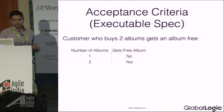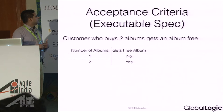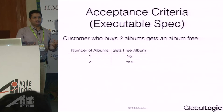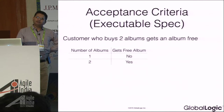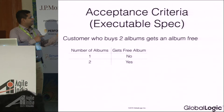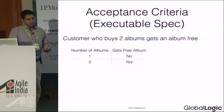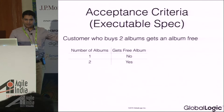This is how acceptance criteria looks. Specification by example means you have specs, but with examples you get more clarity. If I say 'customer who buys two albums gets one album free,' I'm giving an example. One album? No. Two albums? Yes. It's a very simple example, but the concept extends to complex examples as well. Based on that, the QA creates acceptance test cases as executable specs, and the team executes them.